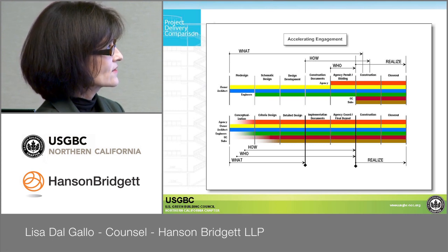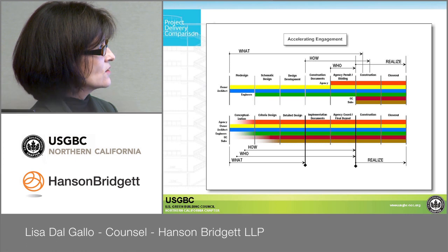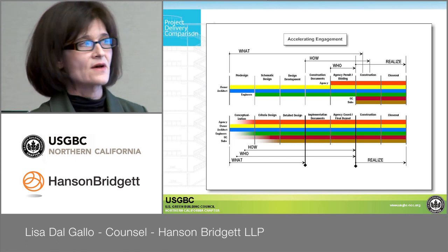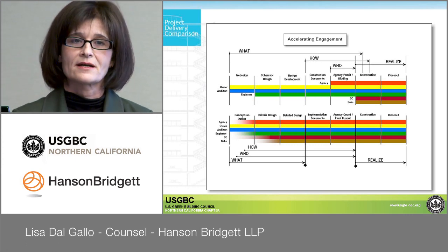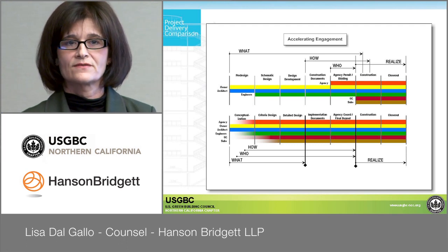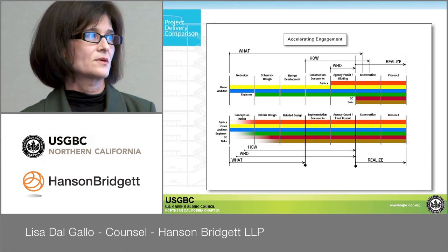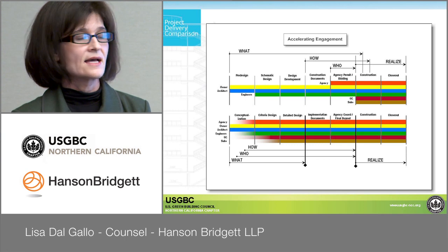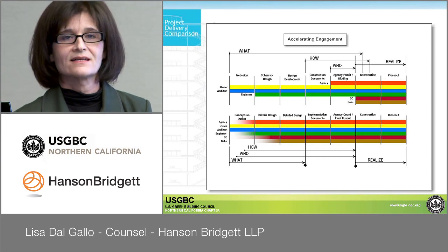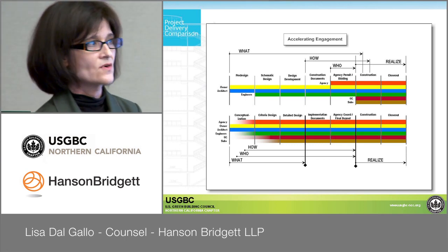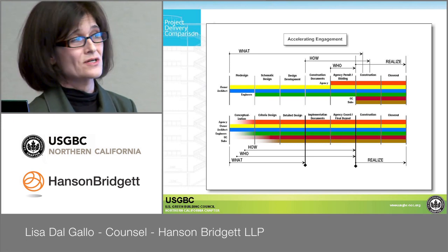This thing is not working very well because usually they'll bring on some subs during design development and the construction document phase to start pricing things out if they know they're going to get the job. This is not in a public works situation. And so they'll have an idea of what's going on and who's going to be involved a little bit earlier, and if they're paid for pre-construction services.